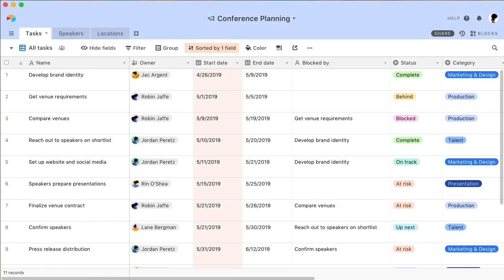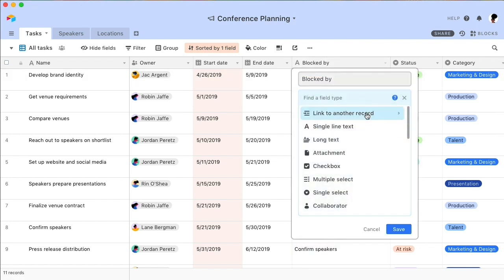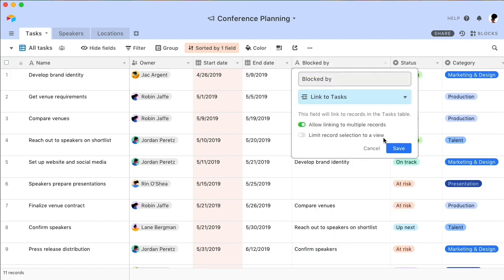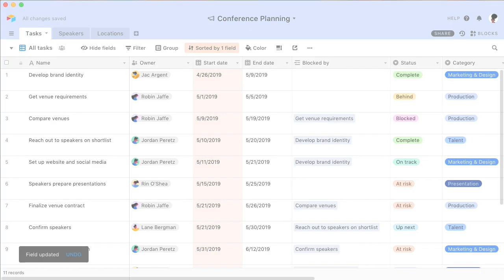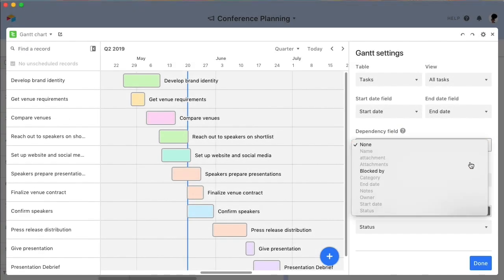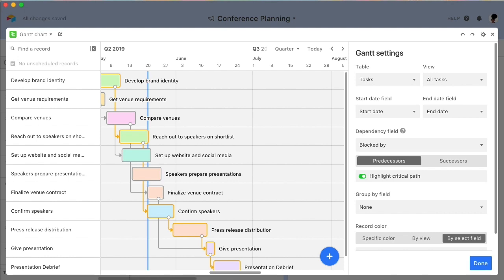If you already have a field with predecessor or successor information, say because you imported an existing spreadsheet into Airtable, you can easily convert it into a self-linking linked record field. The information will automatically be transformed into linked records. Select this field in the block's dependencies settings, and your dependencies will automatically appear on the chart.